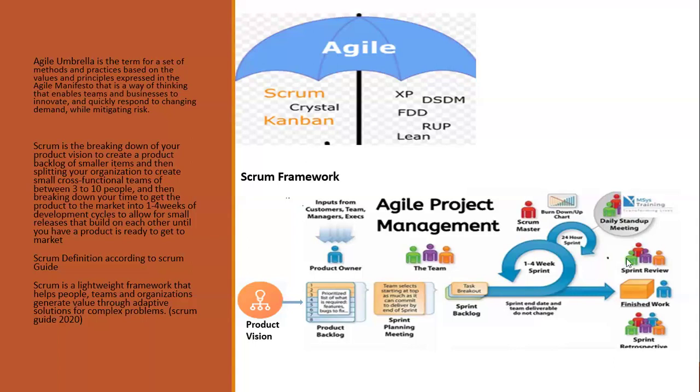Now, the next event we have is called sprint review. So what is sprint review? Of course, sprint review happens when the time box of the sprint that you planned, let's say you selected 2 weeks, elapses. That's the day you're going to have sprint review. So what is sprint review? Sprint review is actually where the stakeholders, maybe external or internal, meet with the Scrum team. Remember, I told us the Scrum team are the product owner, Scrum master, and developers.